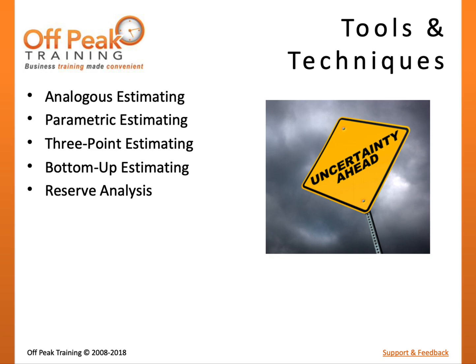Reserve analysis is a technique used to counteract risk by adding a buffer into the cost estimate. In this process, contingency reserve can be added at the activity level based on an identified risk. For example, if we know that a rise in the price of oil might increase transportation costs, we might add a little extra into our estimate in case this event occurs. Cost of quality is a technique used to evaluate all of the costs that will be incurred to ensure desired deliverable quality. We will discuss this further in Chapter 8.